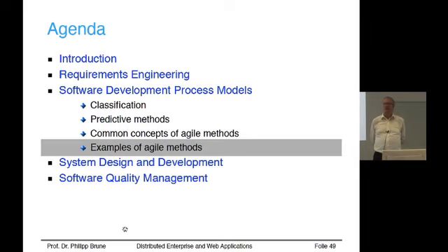But if you go to Daimler, to Mercedes, to Deutsche Bank, you will usually have a lot of sequential development with some small agile islands in between. Some projects where they test it, or maybe some bigger projects nowadays, but still there's a lot of classical. And what is very important at the moment is this idea of hybrid approaches. They have big projects running sequentially, and inside the big projects they might have some component or some function where they say, okay, let's try agile for that because it's not so critical. And then you have to phase that in again. That is a very, very current topic in many contexts.